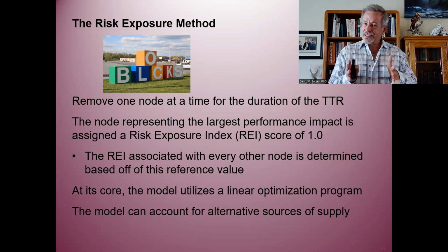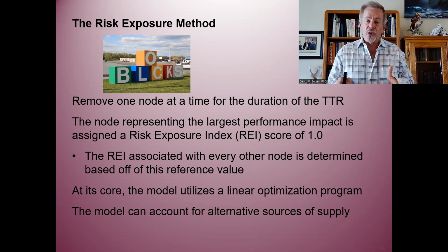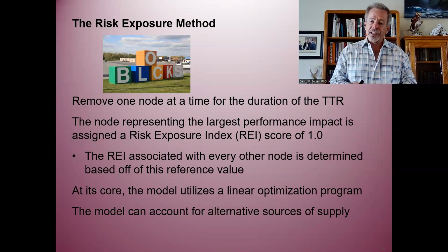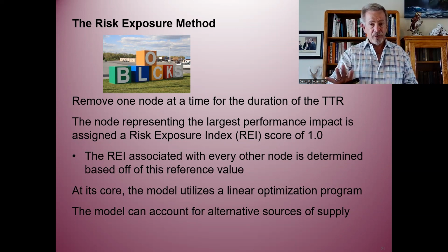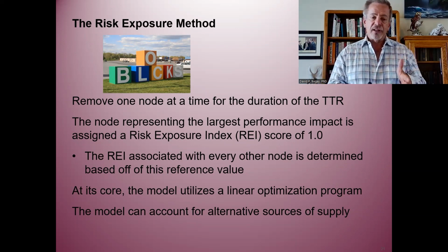And then everything else scales down from that. So that way you can start rating your different parts of the node as to what's the most critical. Really look at your REI with every single node. Your worst one that you have, if it's damaged, is a 1.0, which is your biggest one, and then everything else is some derivation of it that's at a lower base.